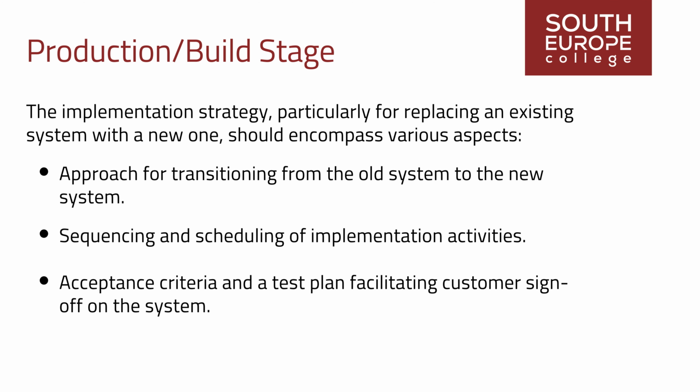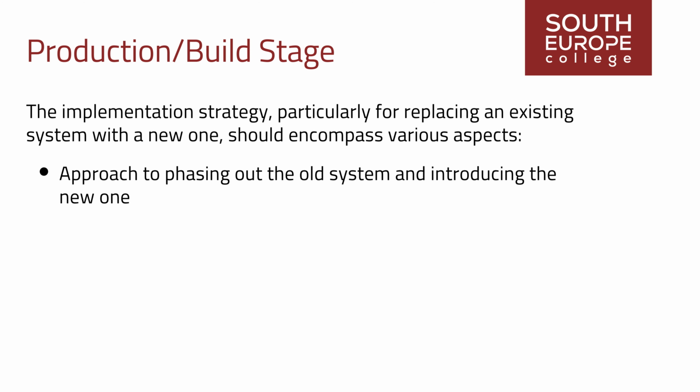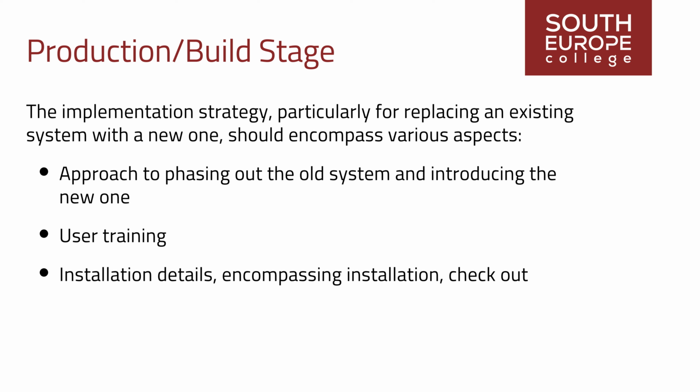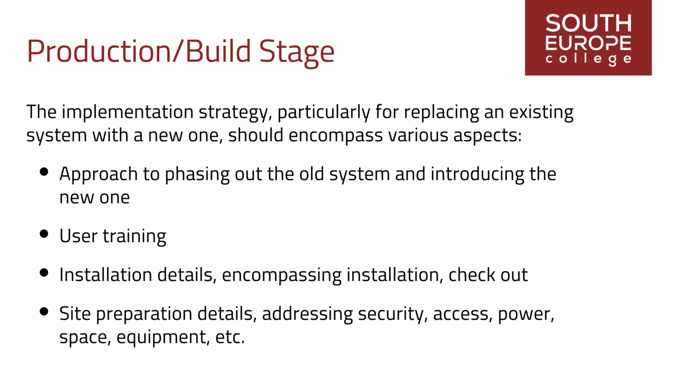Acceptance criteria and a test plan facilitate customer sign-off on the system. Approach to phasing out the old system and introducing the new one. User training. Installation details, encompassing installation, checkout, and acceptance of the end item and side items. Site preparation details, addressing security, access, power, space, equipment, etc.